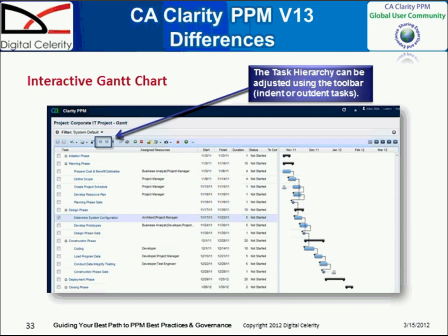Basically, it's going to create a new team member, and it's going to take whatever the default allocation is, whatever you set up as a default allocation. Out of the box, Clarity has an allocation of 100% for whatever duration you've set up for that particular individual on the project. And so it's going to set up the allocation based on that profile.